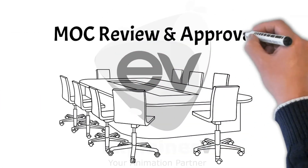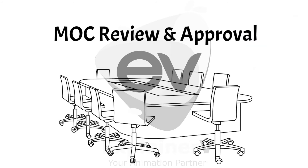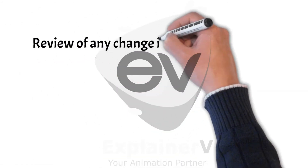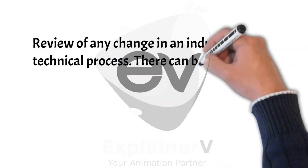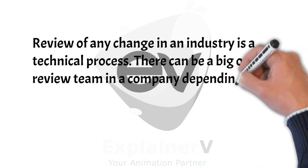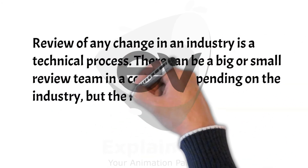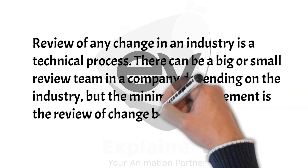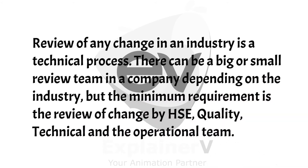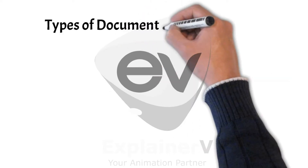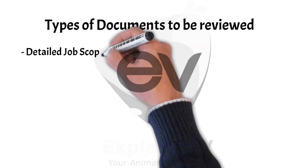Who is supposed to review and approve such changes in a company? Any kind of change review in an industry is a technical and sensitive process. There can be many review members in an MOC approval, but the minimum review should be completed by the health, safety, environment, quality, technical, and operational teams of the company.